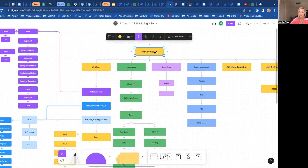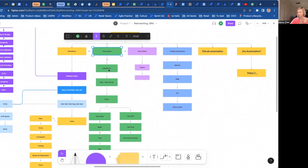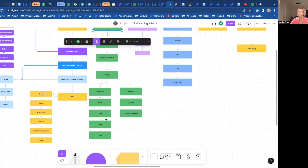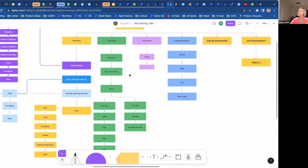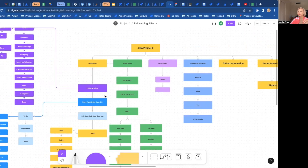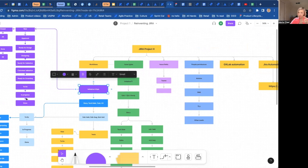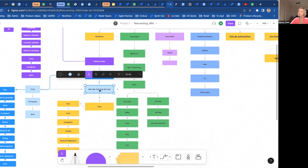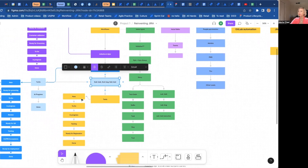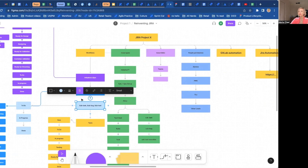So I thought: for a given project, I need workflows, issue types, issue fields, permissions, GitLab automation, and maybe some Jira automation. Just creating a project is just one step. For issue types, I want: an initiative, an epic, a story, a tag, a spike, a task — bug is already there — and a test. So I want several custom issue types. And for those different issue types I'd like different workflows — for example, initiative and epic would have one workflow; story, tech dev task, and so on would have another.